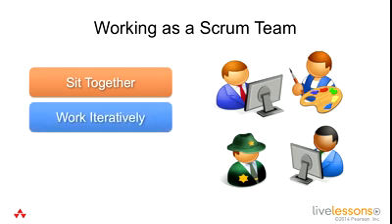And inside the sprint, work iteratively. Don't wait until everything's done. UX designers, don't wait until you have everything pixel perfect. Sketches, Sketchflow, or other products like that allow you to get a rough idea of what you want and then evolve it over time. Show them the early sketches. Developers, if you're developing a 3-page wizard, once you get that first page done, show it to somebody. Show it to the tester. Let them know what the details are. And testers can be talking about how they're going to be tested and interacting and coming back and asking questions. What are we going to do if they click on this or they don't fill that out? This should be an ongoing thing so that we're not waiting to the very end of everything being done before we give it to the testers or the developers.